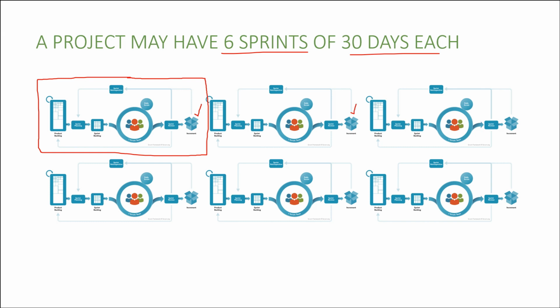You meet with the customer 6 times and the customer reviews the product, and he or she might have feedback after the second time you do the sprint review. The customer may have certain feedback and he might add some features or bug fixes or some items in your product backlog, which again then goes to your sprint backlog based on whatever you decide in the sprint planning session. So I just added this slide for my waterfall enthusiasts so that they can understand how sprints work when it comes to large projects like a 6 month long project.